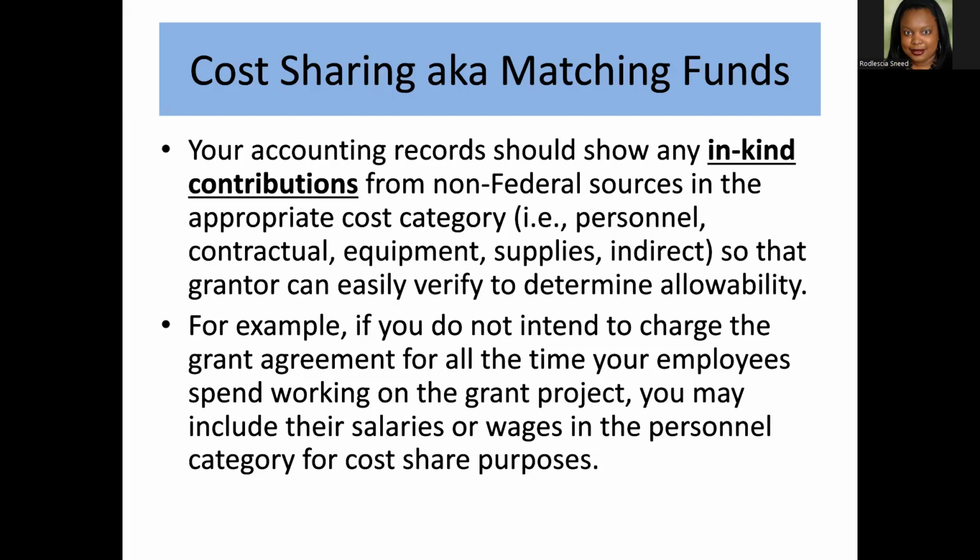Again, if you're giving a supervisor to various different projects, there's only 100% of a person. They may have to work overtime, but that's not something you can incorporate into a grant. A person has to add up, a full-time equivalent is 100%. So make sure you're not overcommitting anyone's time to various grant projects to where it adds up to more than 100%.